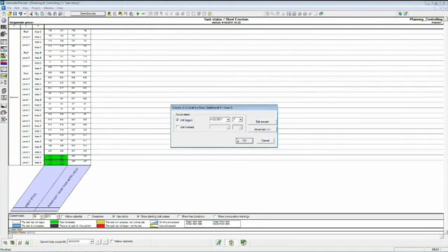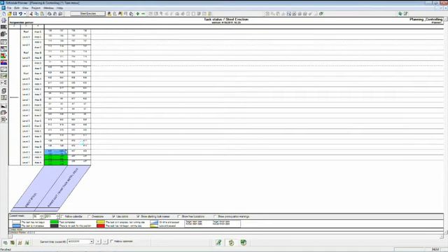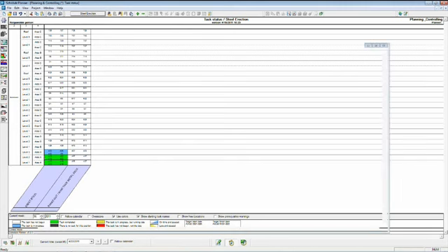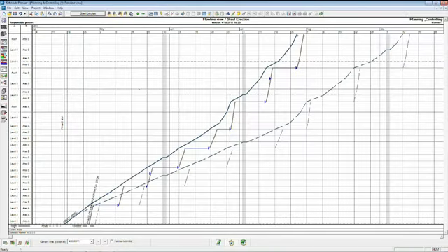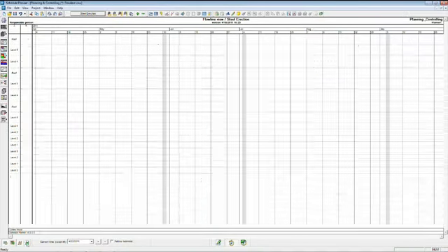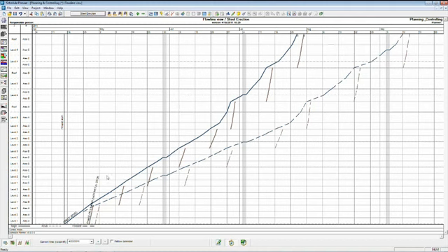The following activity started on the 25th. It's not late. It's in progress. That's the blue box here, because we're not to the 26th yet. We haven't input any actuals, but we were trending a little bit low. If we go back into our flow line and refresh the forecast, you can see that the trend is getting worse. We're still behind. It's a week later, and we're still behind where we were.